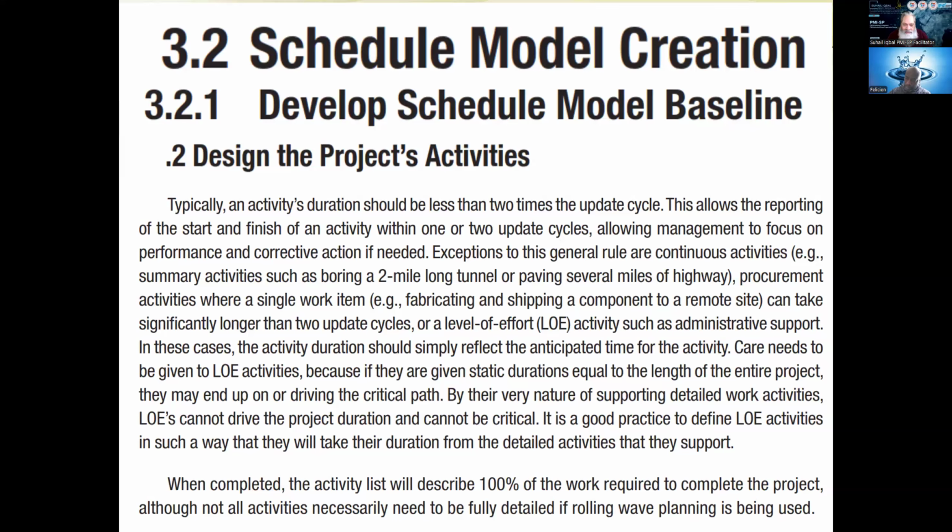The 0-100 rule is: during the life of that activity, the progress being sent is 0, 0, 0, 0, 0. The moment it accomplishes its goal, the progress suddenly becomes 100%. This is the 0-100 rule. But for those activities which cross one update cycle, we can split them into two parts of 50% each.